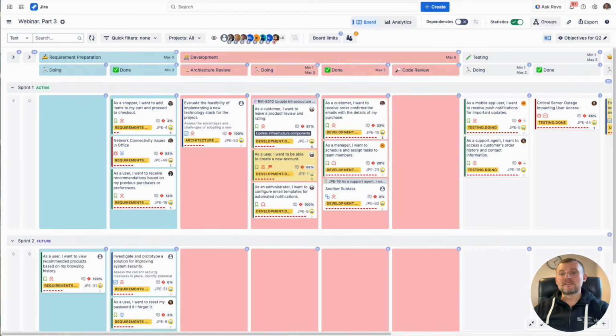Let's focus on the most common scenario: Kanban or enhancing Scrum with Kanban practices. This is one of the most popular use cases among our clients. Once the columns are defined, you can group them into column groups to represent specializations or stages, or you can implement doing done principle using column groups.